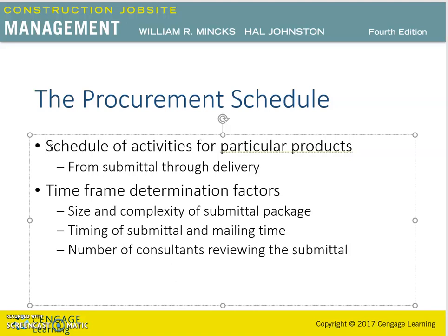So many contract forms require that the contractor provide a schedule of submittals to coordinate with the construction schedule. The contractor must discuss the time that is necessary for the approval of submittals with the architect. Some of the factors that apply when determining the necessary time frame for these approvals include the following. The size of the submittal package to be submitted.